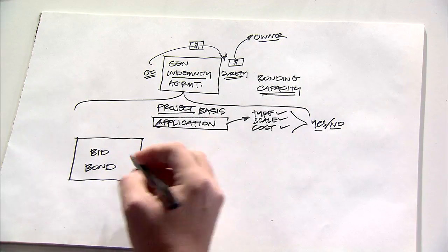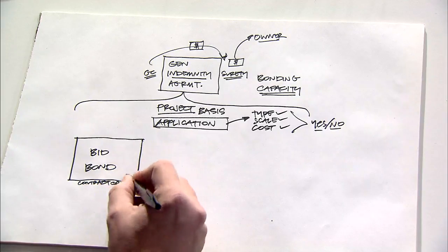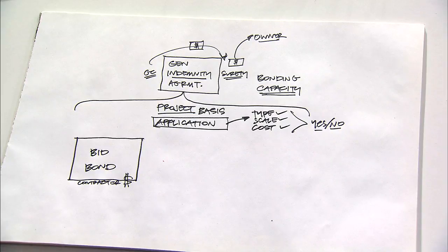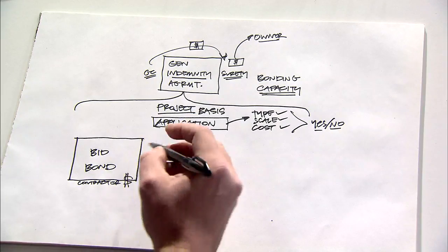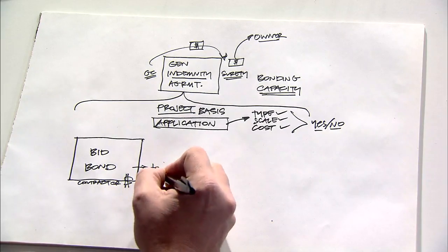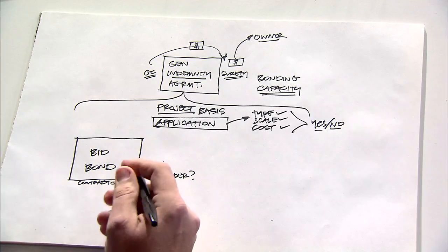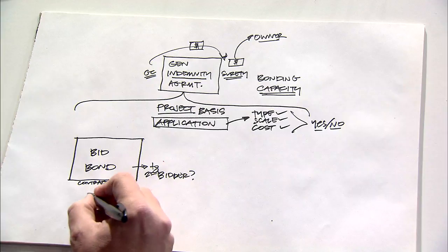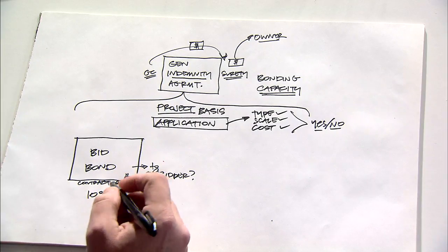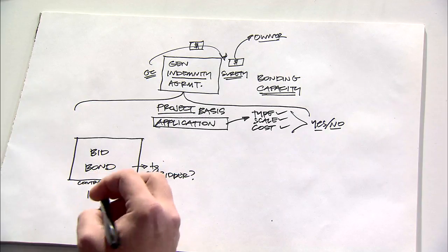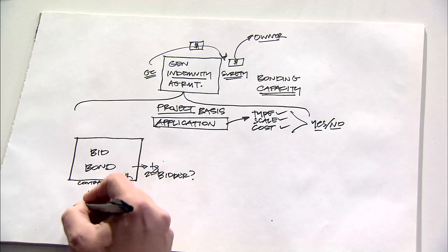If an owner accepts a contractor's price and counts on that price to secure funding or to make commitments, then the bid bond is a type of leverage for the owner in case an issue arises with the low bidder that requires he go to another. A fundamental issue with the bid bond is that as construction projects have gotten more and more expensive, the face value of the bid bond has less and less of an impact on the owner's ability to cover any substantial costs going to another bidder.